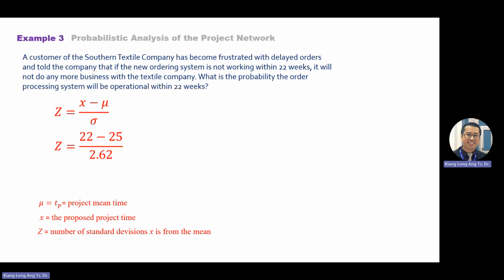So this one, what area do you actually need to calculate? Here. Why? Because this line is P x less than or equal 22, the one that I label with a bubble. Can you see it? So this one, you read from the table. Later, you need to take 0.5 minus this value.